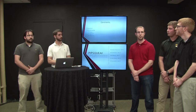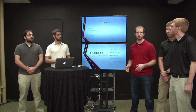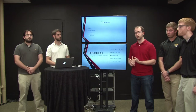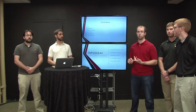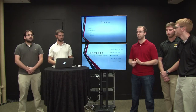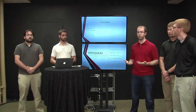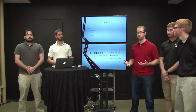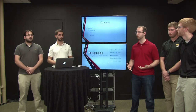When we were planning for this project, we had to consider a number of constraints. The primary one is economic — to try to make it as close to a real-world scenario as possible, we considered $100,000 for incidentals, not counting our salaries, which would cover office space, software licensing, renting servers, and things of that nature. There are also environmental constraints: there are five of us, so with that human constraint, we had to design a project that the five of us could implement well in the three-month period and make sure our scope wasn't too broad.